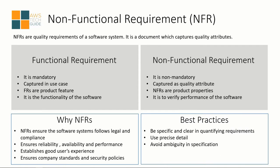What are the best practices when writing non-functional requirements? First, be very specific and clear in quantifying the requirements. As I gave an example — when your client says the application should be very fast, your question should be: how fast? 10 milliseconds, 20 milliseconds, or 30 milliseconds? Specify those requirements — that's why it is called quantifying requirements. Use precise details and avoid any kind of ambiguity. There should not be any different interpretation by anyone reading the NFR.